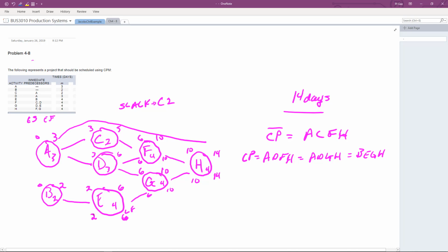You notice when there's no slack time, I keep calling it wiggle room, but if there's no slack time in there, that the early starts and late starts are the same. Okay, you're not going to have any slack time to play around with in there, so we can move the late start to the late finish here. 2 minus 2 is 0. Everything's happy. Just what we would have expected.